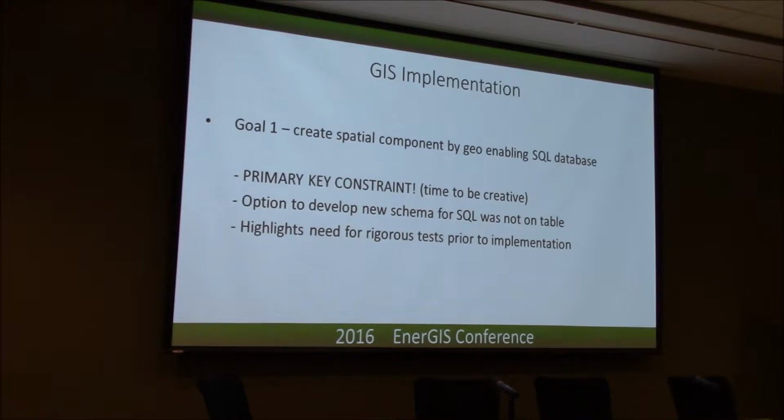So we had to be creative. We had to come up with a solution. We had some meetings. We brought in some other consultants to come up with some options. Ideally, if we could have written the SQL attribute data to just be a GIS database, that would have been the ideal solution, I think. But that wasn't on the table. There was too much work already done and time spent on that. So it really highlighted the need for more rigorous testing prior to implementation of the project. That's a lesson learned.